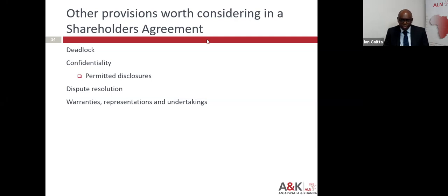Those are the kind of disputes that perhaps don't necessarily need to go to court or arbitration, but perhaps can be subjected to an expert determination or an audit of those costs. Then other disputes that are more legal in nature could, for instance, be subject to either mediation or an arbitration or a court mechanism.